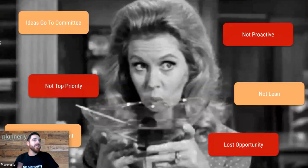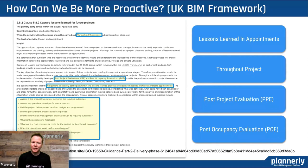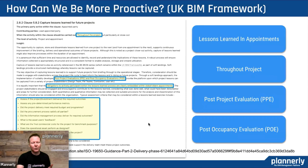One of the great resources is the UK BIM framework. They unpack the concept of lessons learned a little bit more, and there are a few really key concepts. One is making it part of the team's appointment documents, so making sure that they're aware of it contractually, making sure that it happens throughout the project, and making sure that it's not something that's just an afterthought that happens at the end.